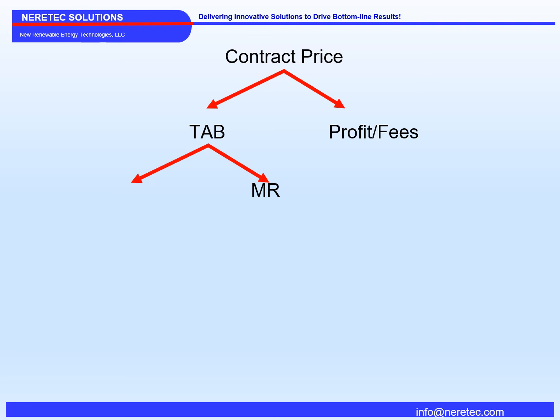The first one is going to be your management reserve. The amount you put in the management reserve will depend on your company policies. It will depend on the project management maturity level of your company. Your company policies define what percentage of the total allocated budget will be allocated to the management reserve. The management reserve is a budget withheld by the program management to cover things like unknowns and risks.